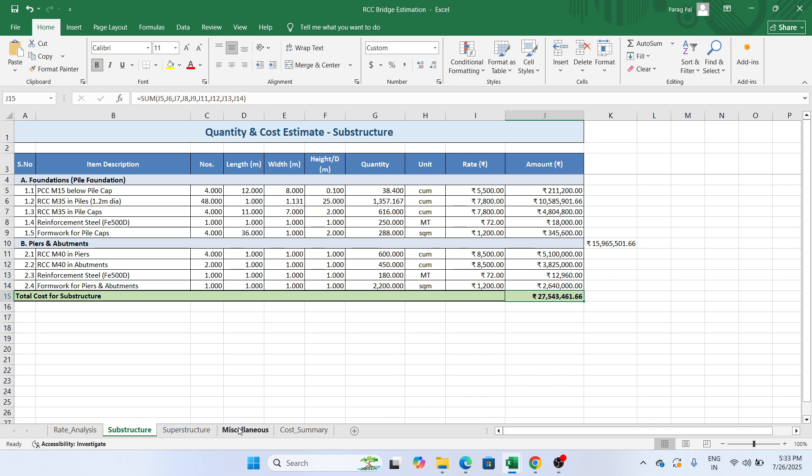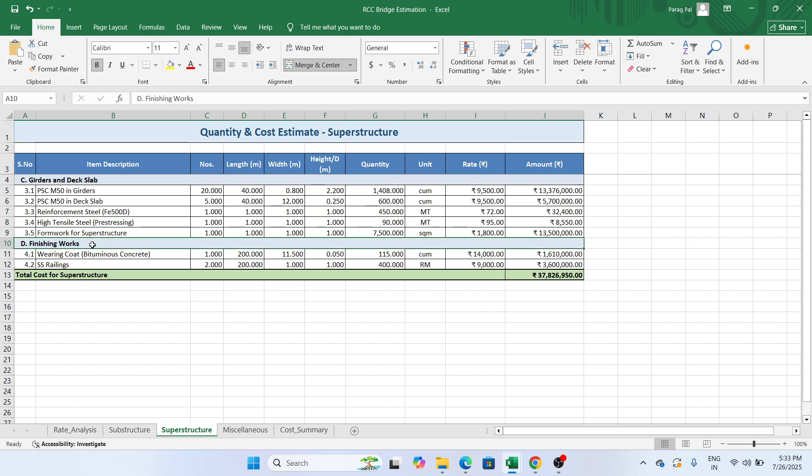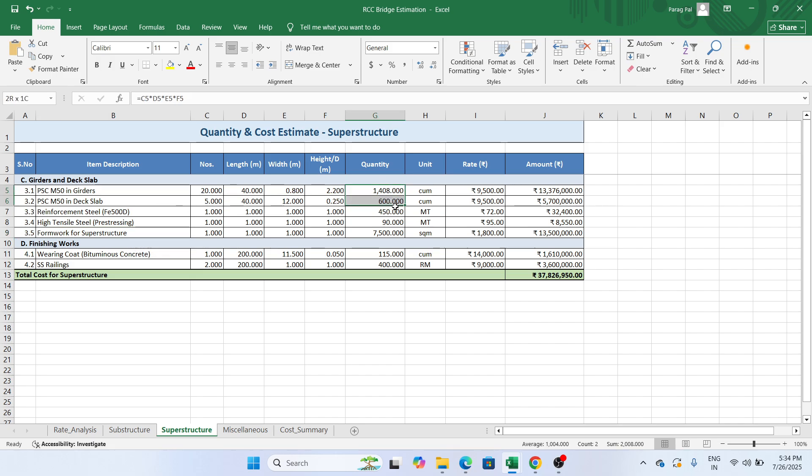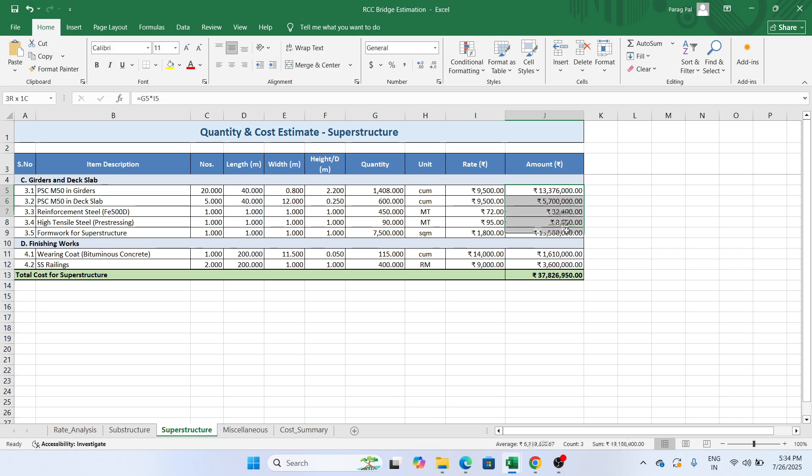Now if I go to the next sheet which is superstructure, in the superstructure you need to construct the girder, deck slab and the finishing work. To construct the same you have the PSC M15 girder, prestressed concrete, prestressed concrete in the deck slab, reinforcement steel, high tensile steel and the formwork. You need to add the number, length and width to get the proper quantity. Then you have a unit and the cost rate is coming from the first sheet referring to this area. You will get the total cost of construction for the girder and deck slab is 3.2 crore.